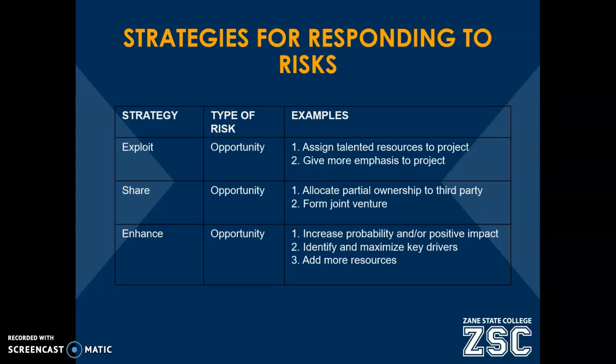And then finally, for dealing with opportunities, you can exploit an opportunity. If you see a chance to be successful, you want to put your best people on it. You assign your most talented resources to that project. You can give more emphasis to that particular project. You can share an opportunity. You might form a joint venture with other companies to share the opportunity. By forming a joint venture, you're also potentially sharing the risk as well.